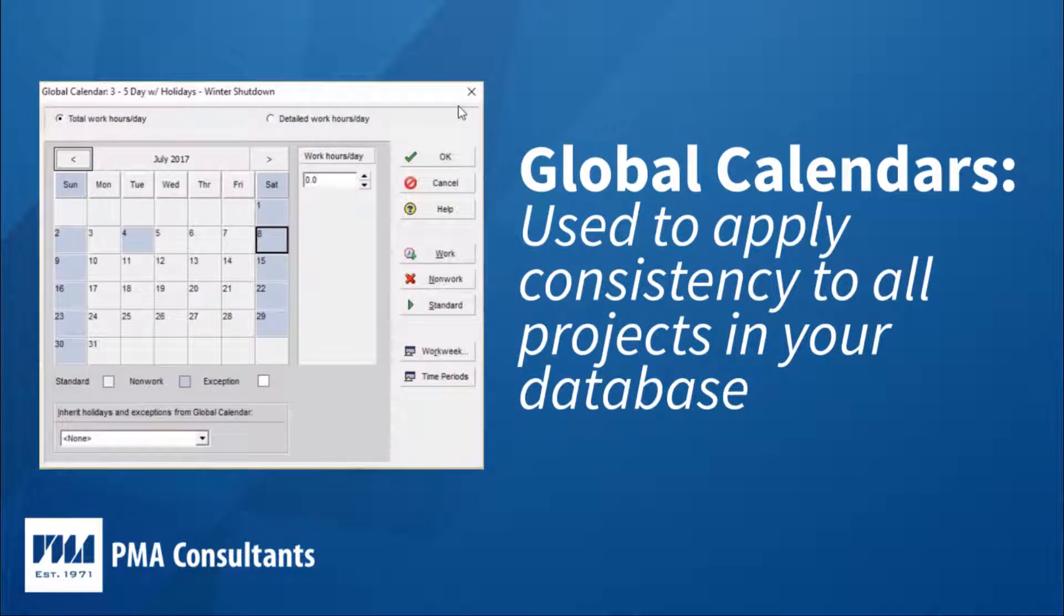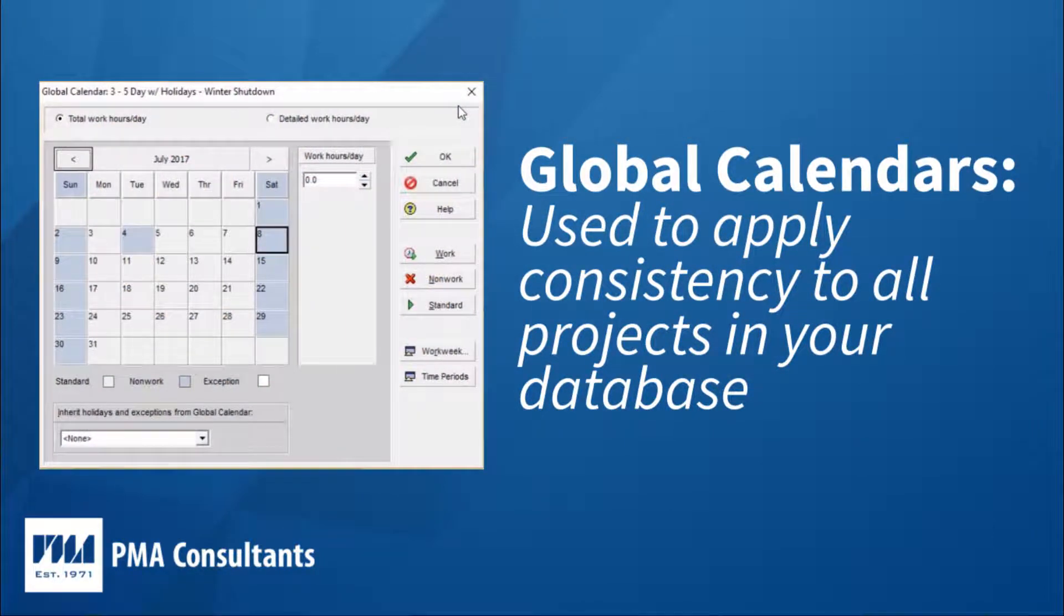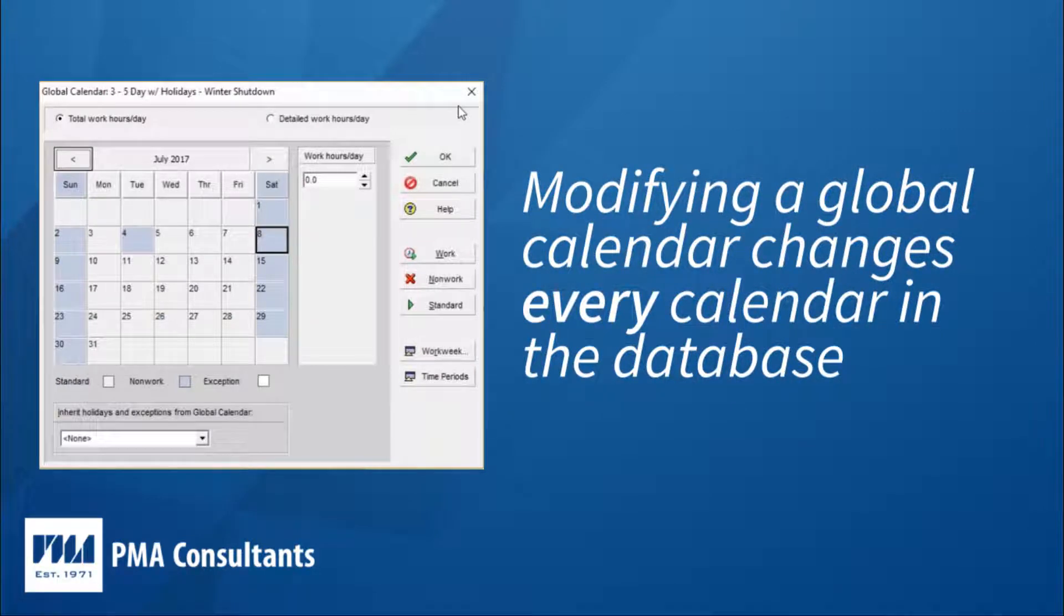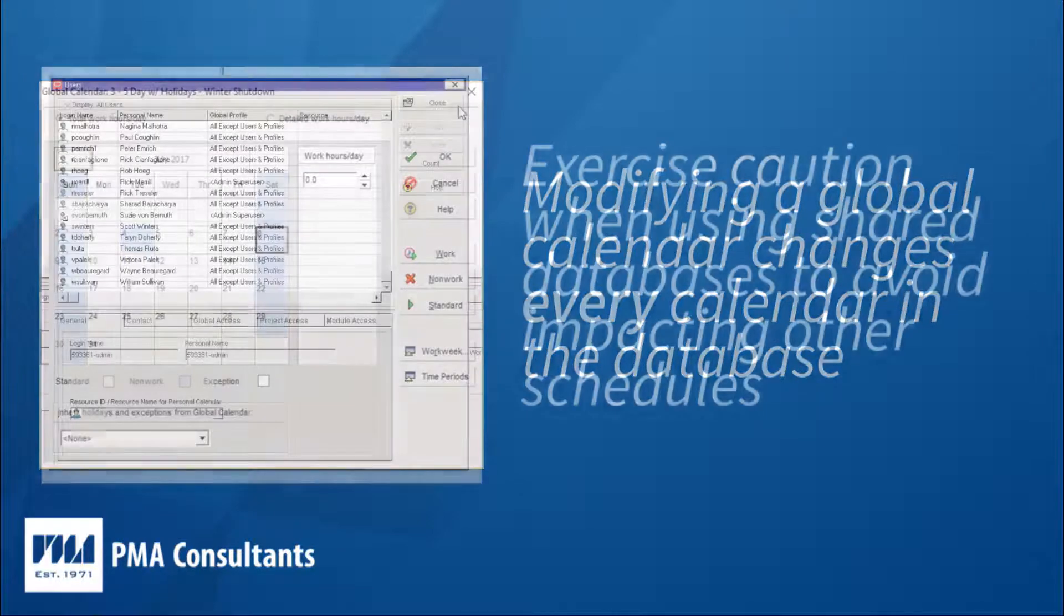Global calendars are used to apply consistency to all projects in your database. When a global calendar is modified, it doesn't just impact one project. The changes affect every single project in your database using or referencing that global calendar.